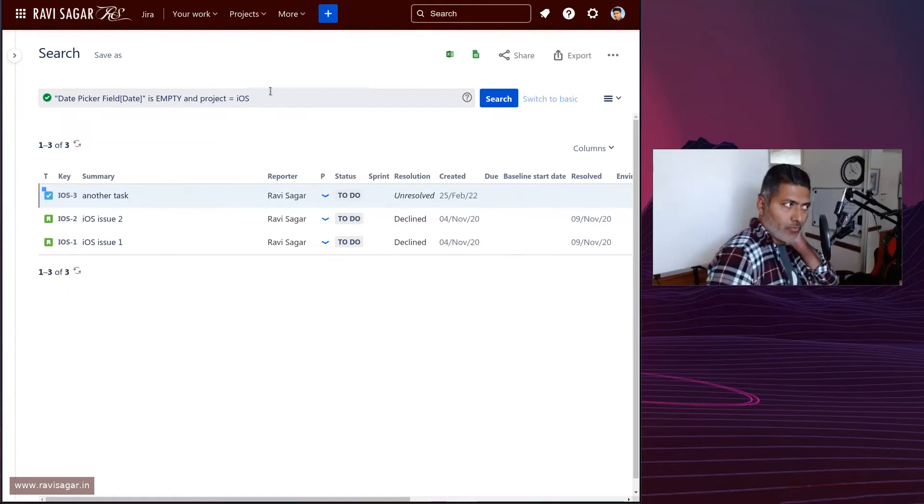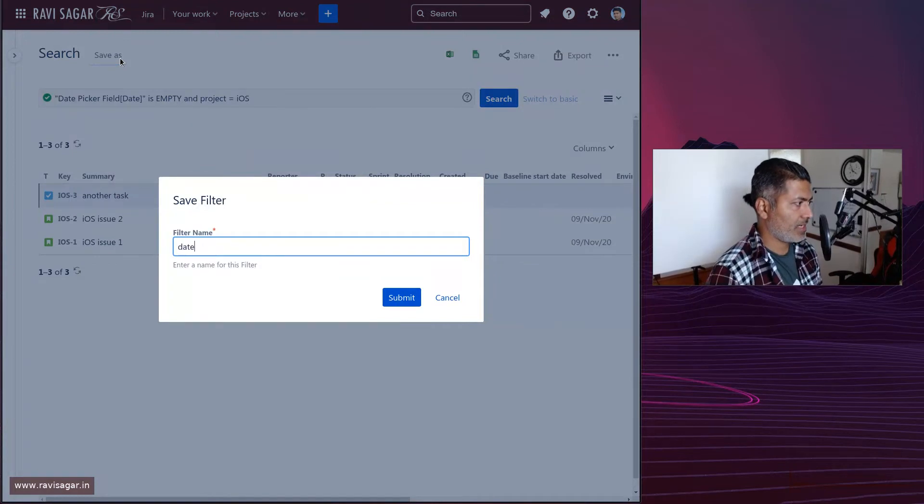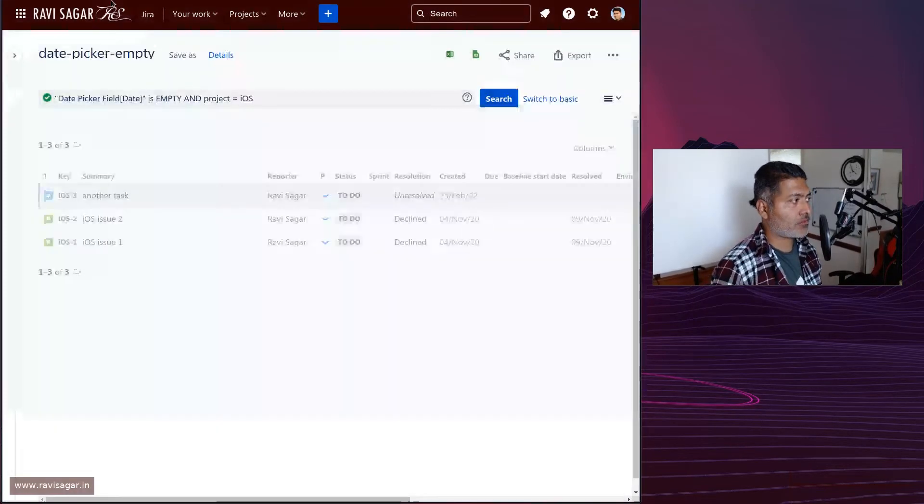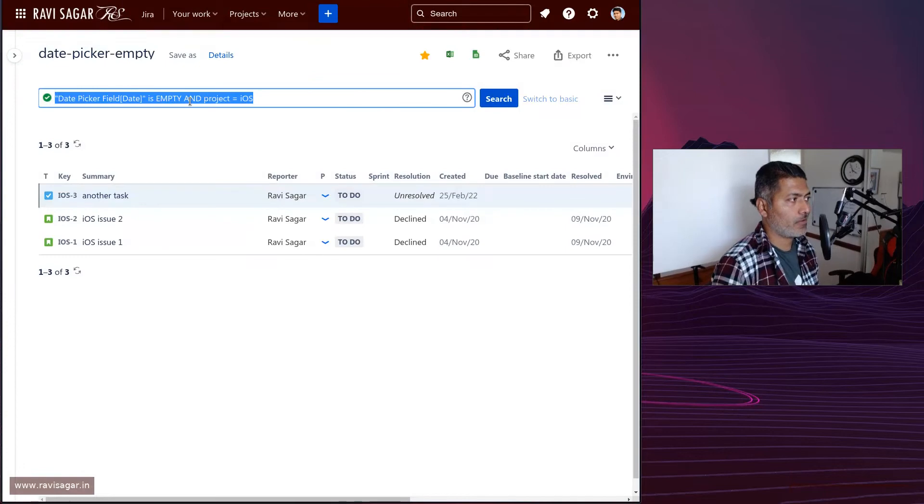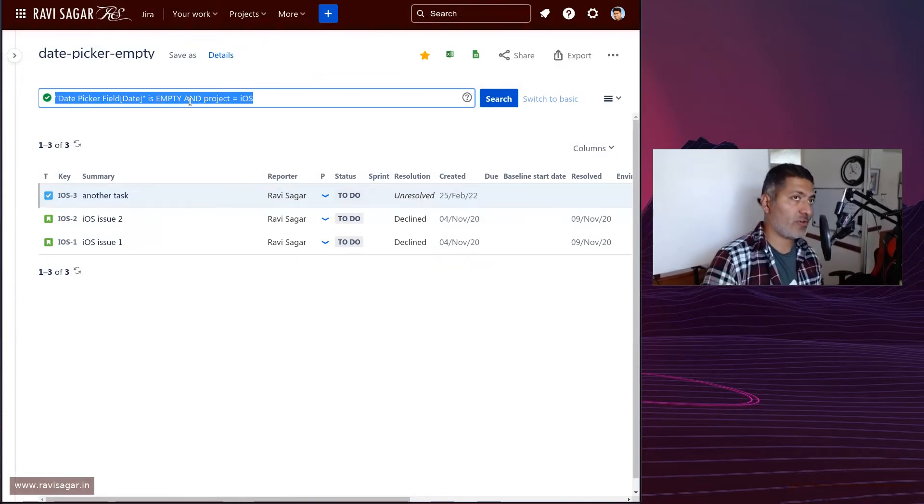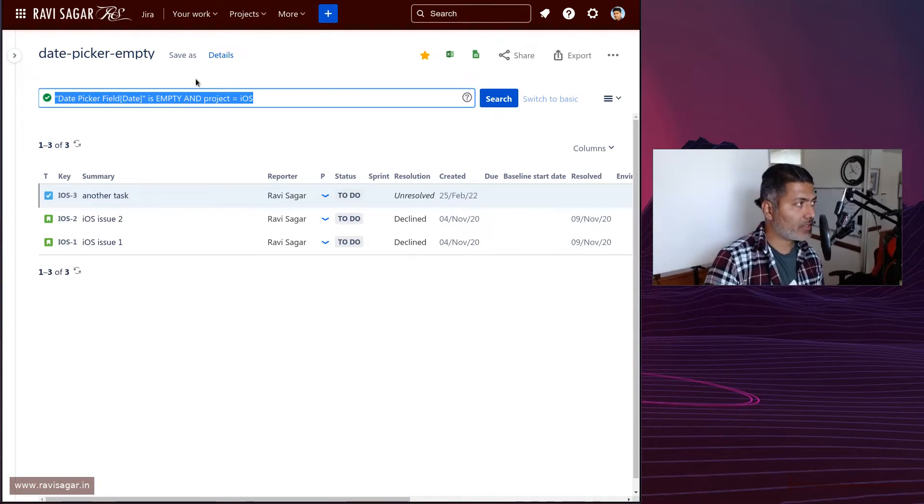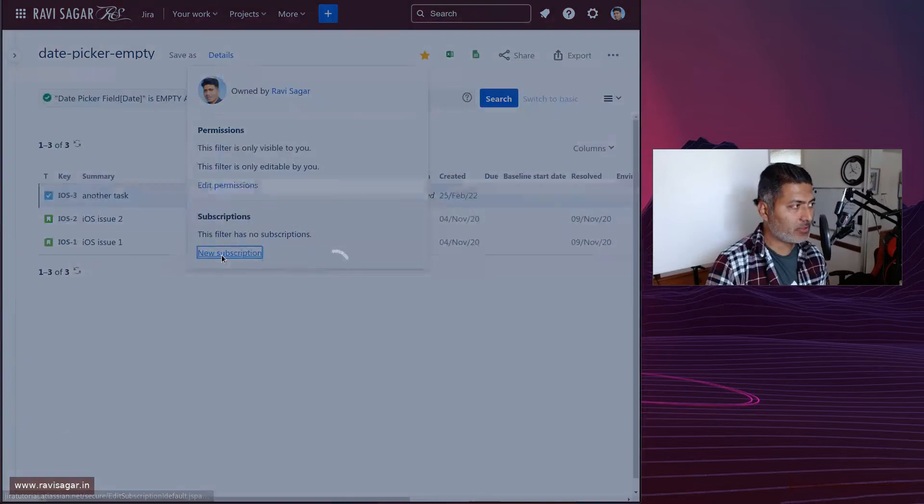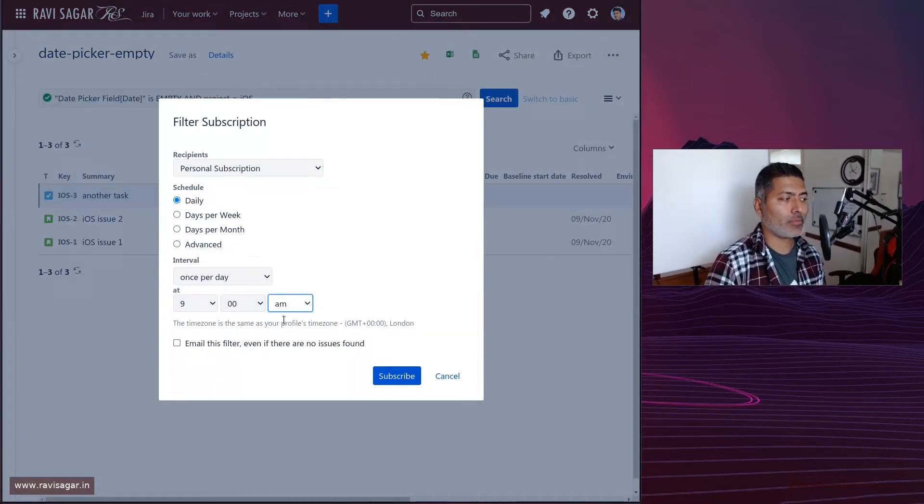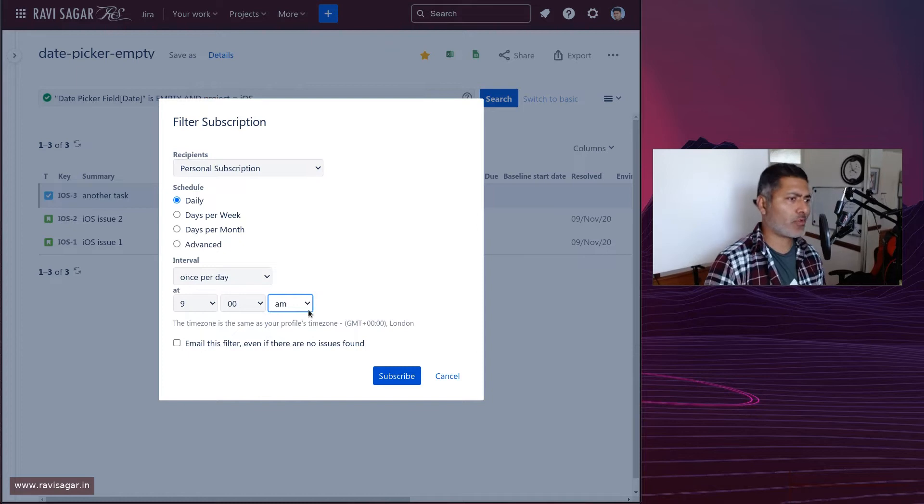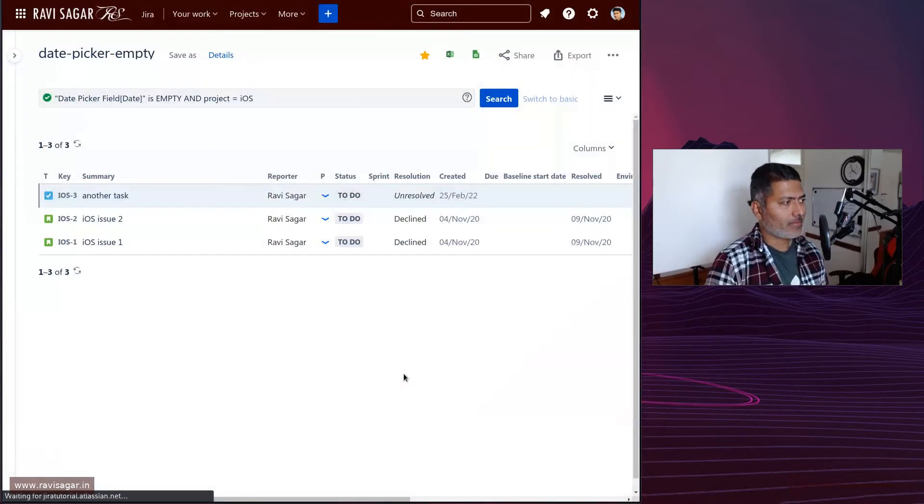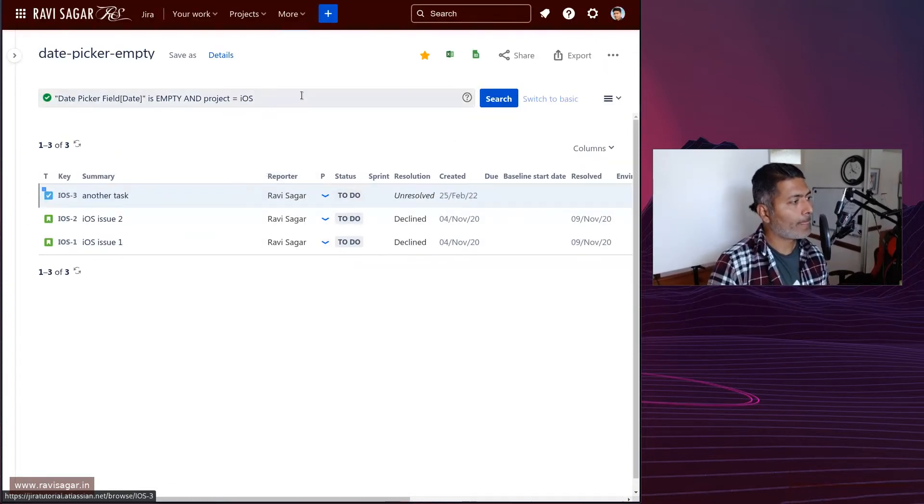What you can do is you can save it: 'date picker empty'. This is your JQL which you have saved, and now you can do a lot of wonderful things. For example, if you go to the details, you can actually create a subscription. Let's say you want to be reminded every day at 9 AM or maybe before your stand-up that these are the list of issues where people have not really filled in the date field.